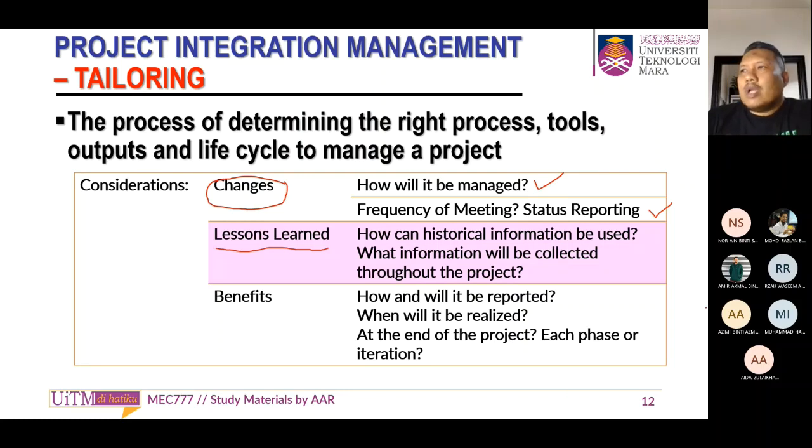So that's why in the project we need to have very frequent meetings when we find it, and then we need to change, we need to discuss, and then everybody needs to agree with the changes, and then we can change. Especially with the civil engineers, we need to get permission from them whether this change affects the calculation for the structure or not.